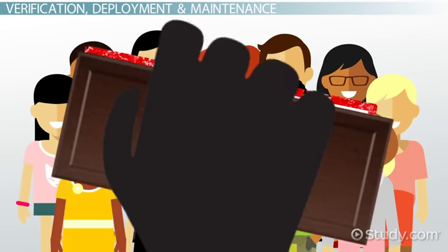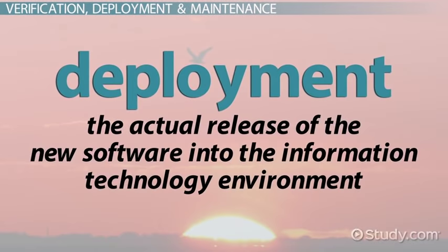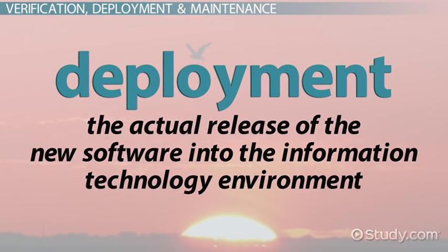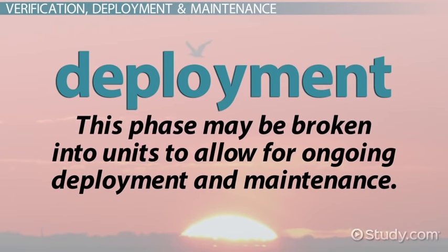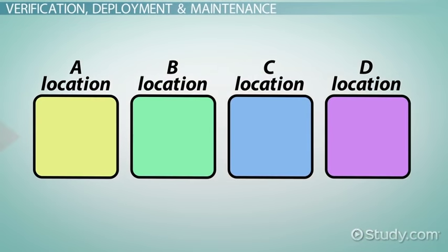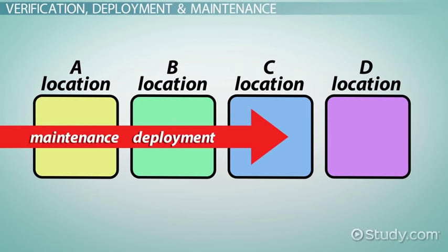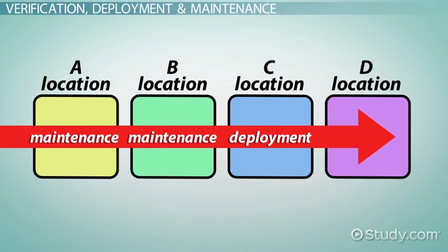Once the software is fully verified and approved for release, the deployment phase is the actual release of the new software into the information technology environment. The deployment phase may be broken into units to allow for ongoing deployment and maintenance. For example, the software may be deployed by location — once a location is fully deployed, it moves into the maintenance phase while another location begins the deployment phase.